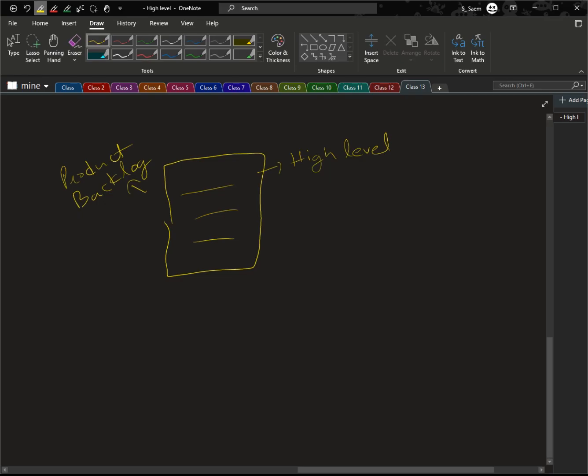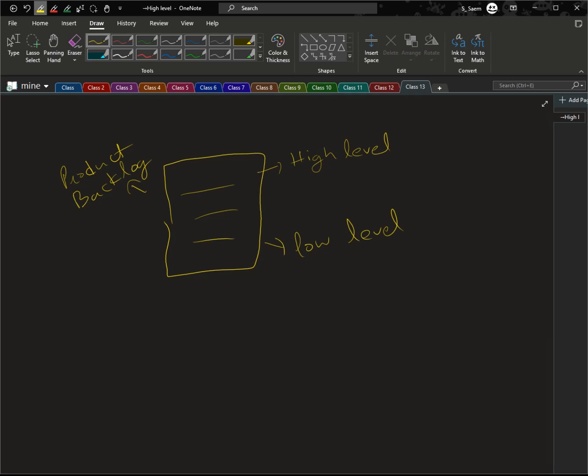The backlog is prioritized after consulting with business analysts and other stakeholders. High priority items are placed at the top, where the low priority items are placed at the bottom of the backlog. So they are low level priority. So the Scrum Master uploads all the backlogs into Jira. They ensure that all issues are properly categorized and linked to epics as needed. So they may also contain user stories, etc.